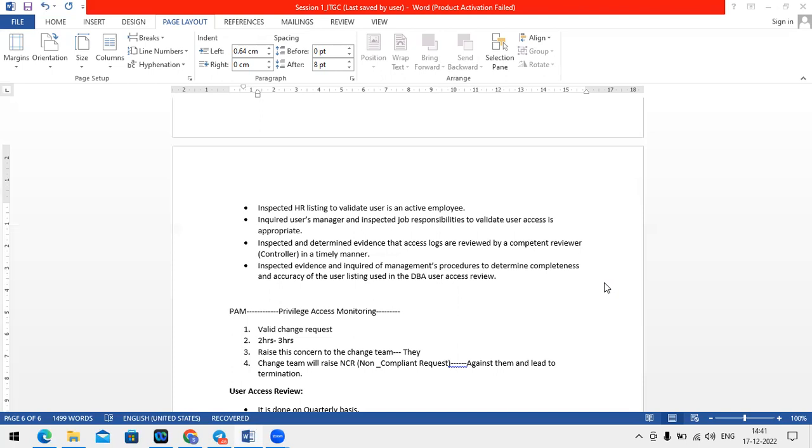So that is the reason everyone says that you refrain from using group names over there, because even if you raise a change request, you have a change requester name, you have a change implementer name, and you have a developer name as well. So you have to specifically tell them who is the person who is going to implement this particular change. Even if you put a group name over there and anyone from the group will implement that change, it's not going to happen. You have to specifically tell them which particular user in that group is going to implement the change, because accountability should be there. It's not like someone from the group will implement and tomorrow if something happens, who will be held responsible? So who would be accountable for that? So accountability should be there.